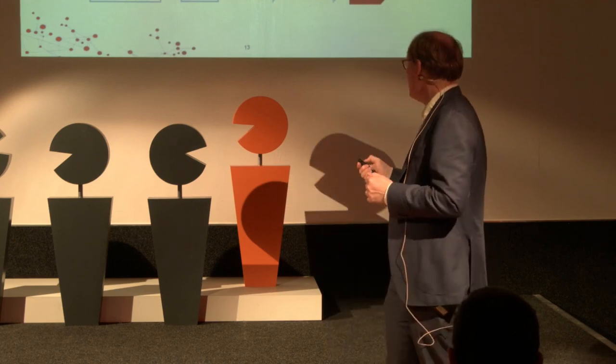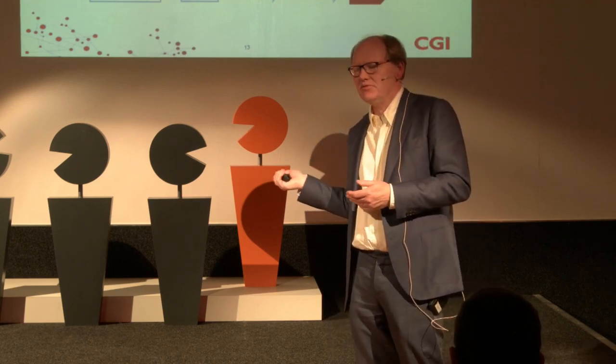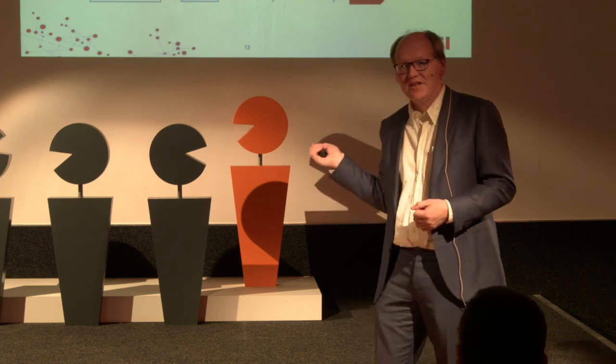And so then you need to figure out, how do we do this? Do you build, first of all, for the teams? Do you build feature teams that can actually touch all of the code, or do you build component teams that are experts on one piece of the solution? And then with the architects, the same thing. My advice there is always to actually cross-connect those. If you have feature teams, then the architect should be a specialist on one structural area. But if you have component teams, then the architects actually should be the ones that are able to connect those and have the whole picture. So architects are about bringing context to the agile delivery team.